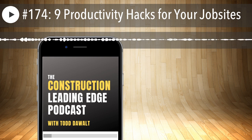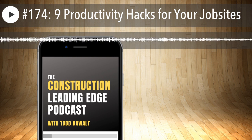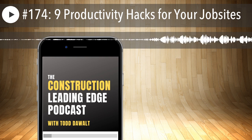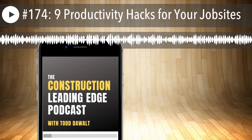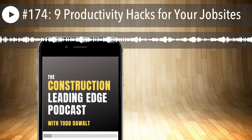And you may be wondering, what's a profit bleed? Well, a couple of examples. Actually, if you want a deep dive, go back and look through my podcast episodes, and there's an episode with 8 profit bleeds that cause really busy contractors to lose. And just a real quick overview. Number one is schedule overruns or schedule delays, lost productivity on your job sites, which we're going to talk about. Rework is a big one. Unsolicited charity, doing work for free, what should be a change order, not getting paid for it. Supply chain inefficiencies, trade partner breakdowns, things not working well with your subcontractor operations, and then leaving money on the table when it comes to selling, not having a good sales process in place, and just not charging enough money. Go through that, go find that episode on 8 profit bleeds, and you'll find a deeper dive on that.